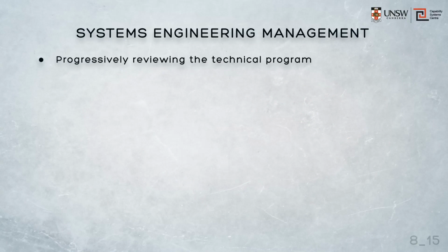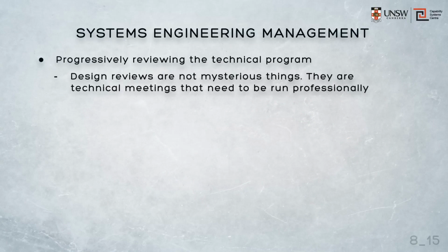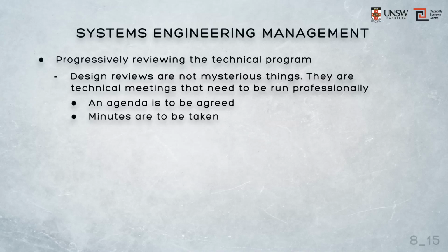Conducting reviews of this nature just makes sense, and they're not mysterious systems engineering activities. They are simply technical meetings that are conducted in a controlled and a professional manner, involving appropriate groups of people that aim to review work packages, approve plans for the next stages, and resolve any problems that are facing the development effort. When I say that the meetings are conducted in a controlled and professional manner, I'm just referring to standard meeting protocol, such as making sure that we've got an agenda for each review which outlines what's going to be covered, how long it's going to take, and who is leading the presentations. Ensuring that minutes are taken and agreed upon prior to the conclusion of the meeting, and an agreed chairperson to maintain control over the meeting.